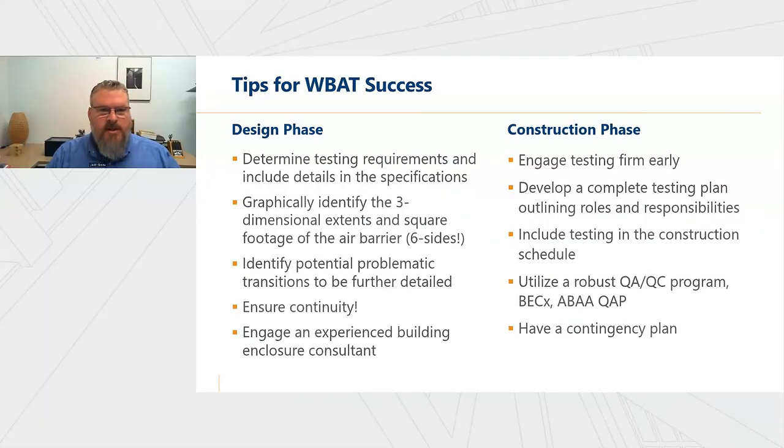Tips for successful testing, just to sum up here. During the design phase, you want to determine your testing requirements and specifications early and include all of those details in your document so that everybody knows what to plan for, that the general contractor knows what they're bidding and what they have to accommodate in their schedule.